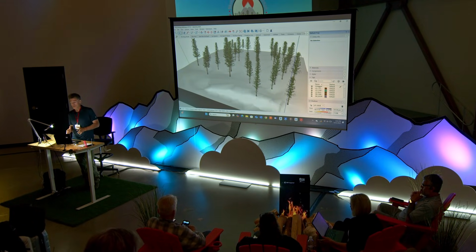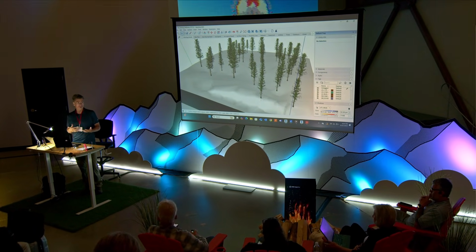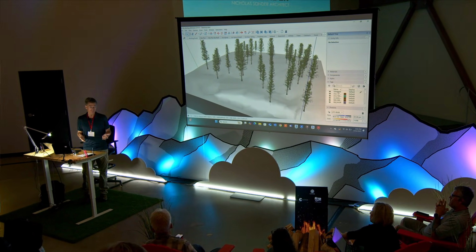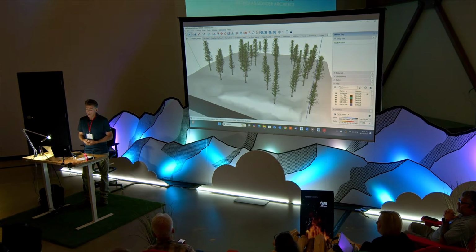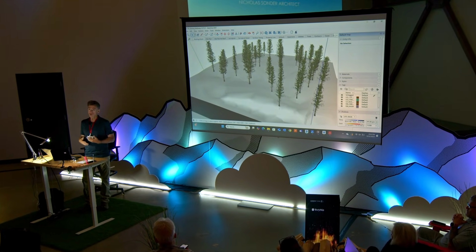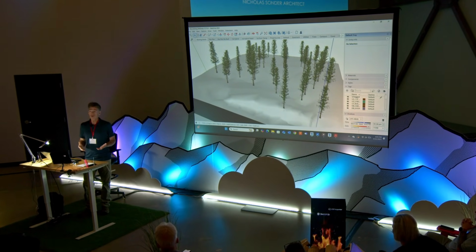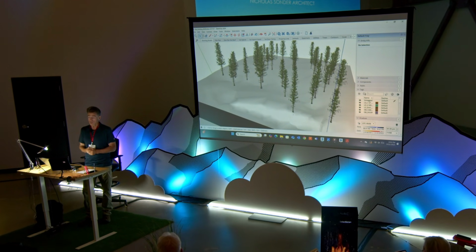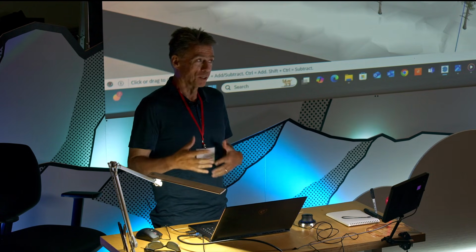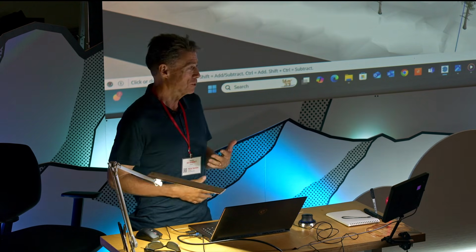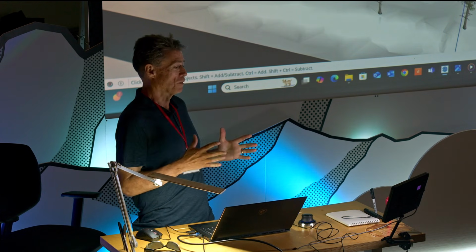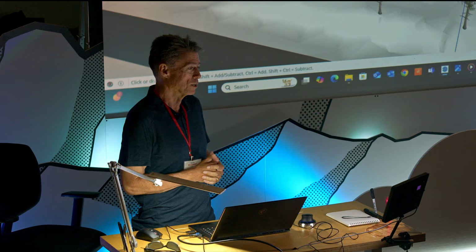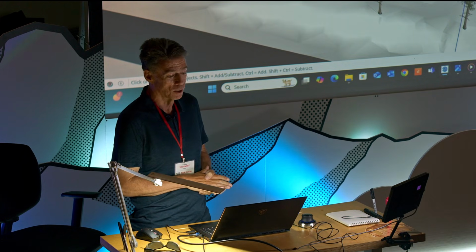The first thing that I do as an architect, and we all do, is we collect information on the project. We generally refer to that as the pre-design phase. And that includes things like getting site surveys done, collecting information from the clients so that we know the full scope of work that we're going to be dealing with. And that can include things like just a space compendium of, this is the amount of area I want in the living room. I want an open plan. I want a certain style of architecture.